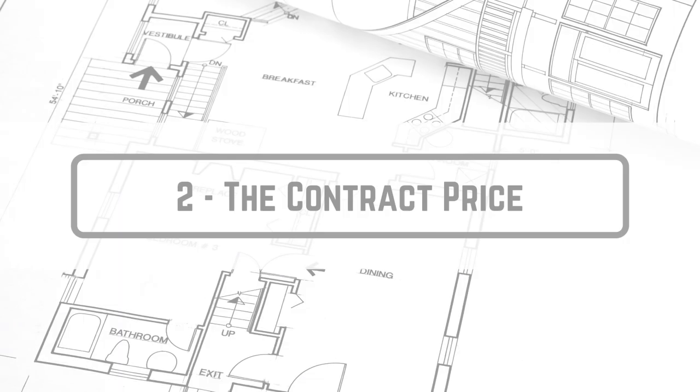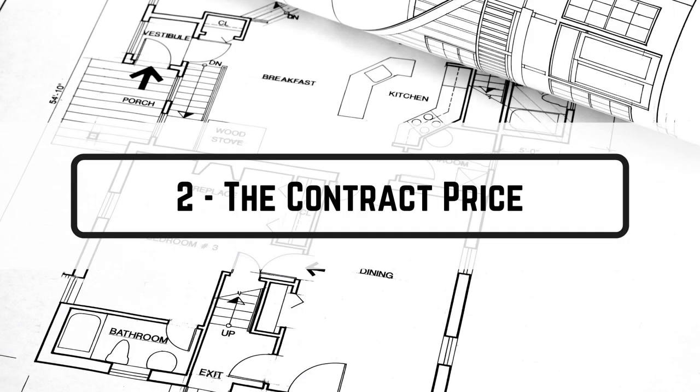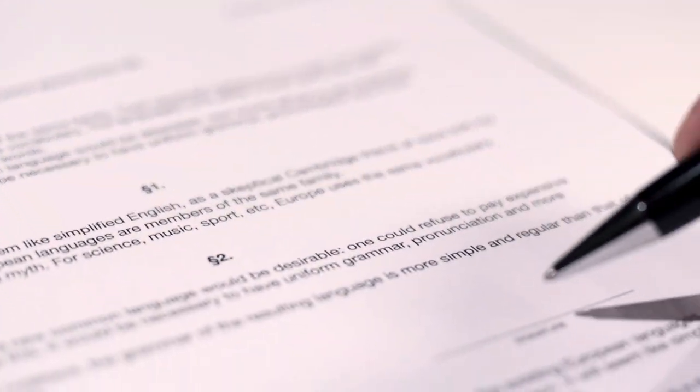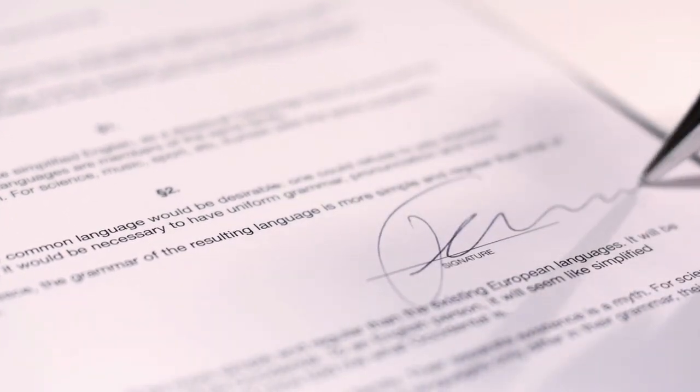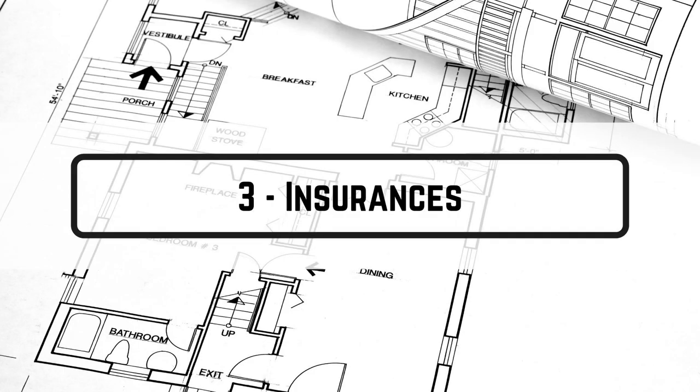The second term to pay attention to is contract price. Whether the contract is lump sum or remeasured, there will be a contract price. In remeasured contracts, you will need some tentative quantities in the beginning to establish the contract price. How much is the value of the works — the contract price — is a very important part of the commercial terms.